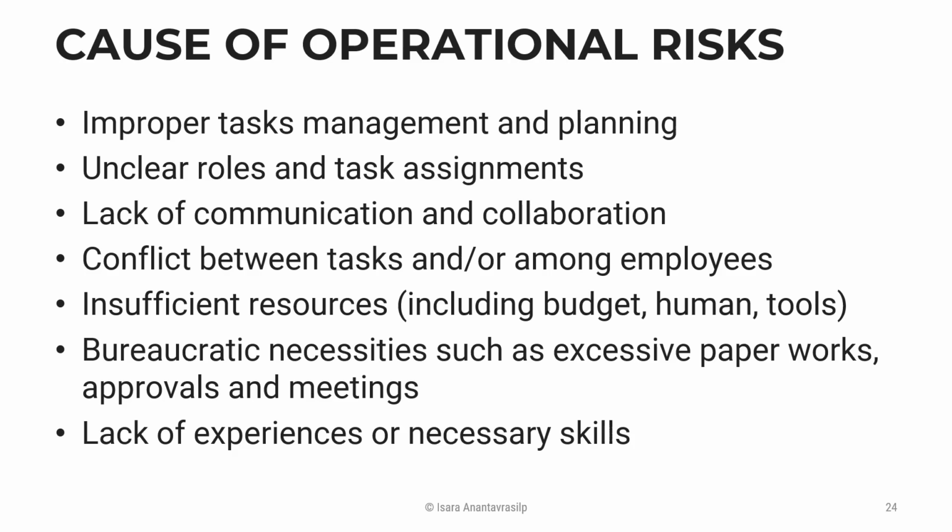We understand that these documents are important, but 500 pages, and then you need to also fix them. The customer didn't just accept the list of requirements just like that. They have to revise and review, and then we need to go fix them and resubmit and so on. It took so much time and effort, and of course money, because you need to pay for your employees as well. And lastly, simply lack of experience and skills required to finish the task.